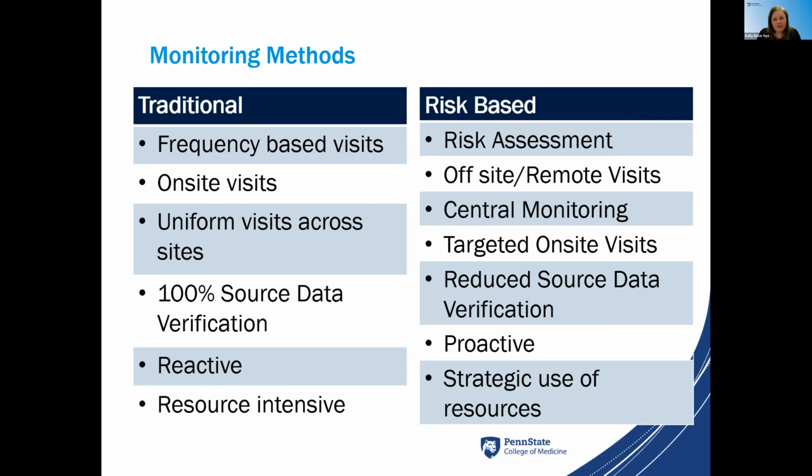So in comparison, the risk-based approach begins with a risk assessment, and this happens prior to the first enrollment of the study, where system level and project level risks are analyzed for the likelihood and consequence of their occurrence. And then based on that risk assessment, risks are either mitigated or accepted.